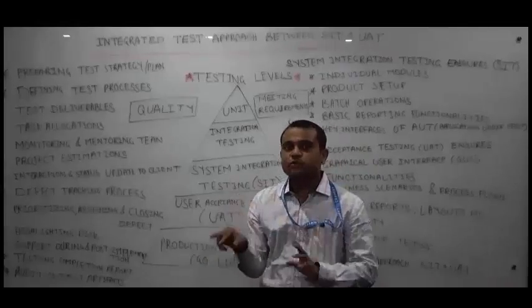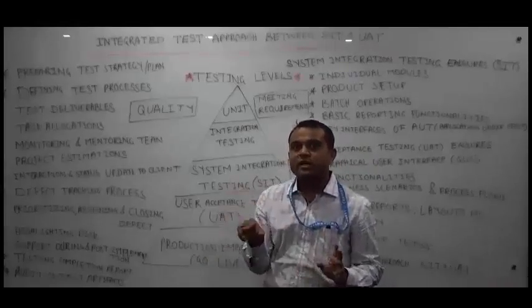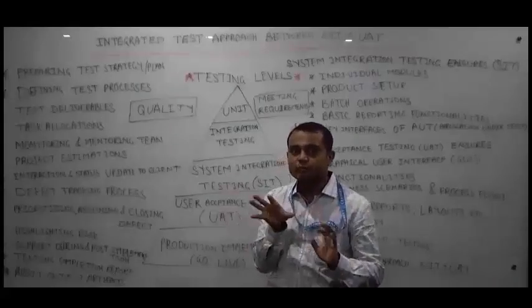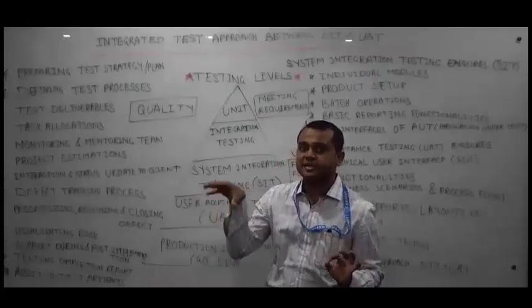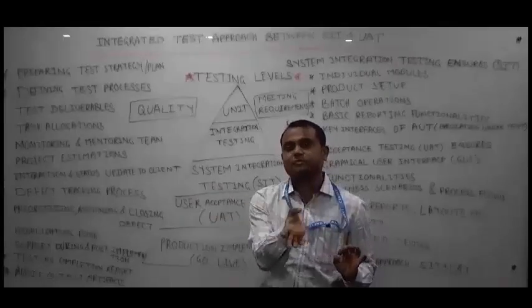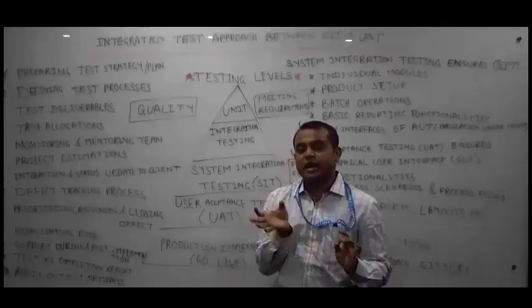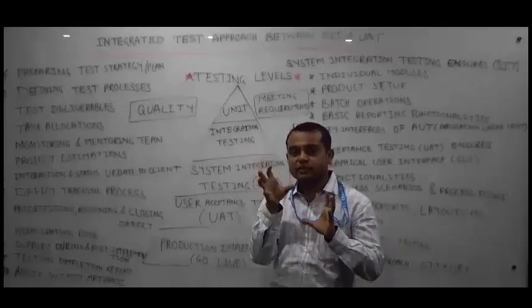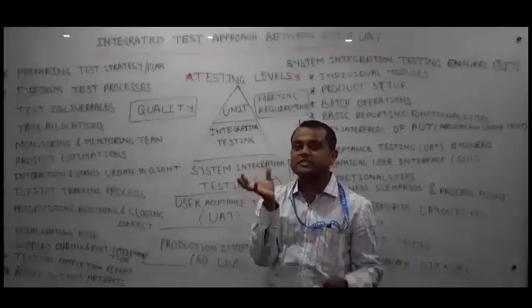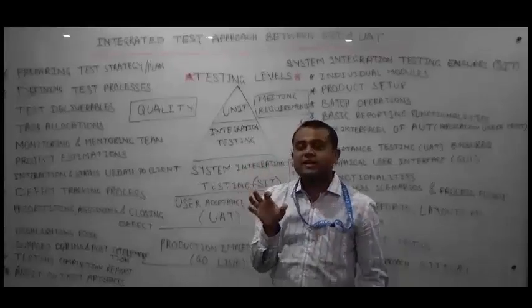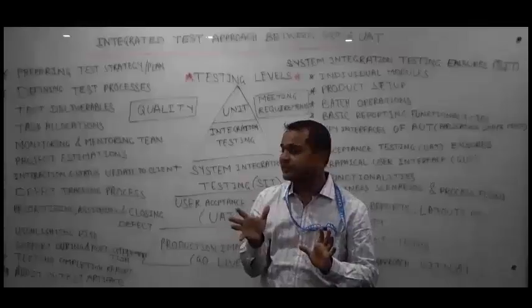And also in that CR both teams will sit together, there will be a combined call, and they will decide which kind of approach to take. The interface related part will be tested by SIT team, and the usability related part will be tested by UAT team, and once they identify the scope, then they will prepare the scripts accordingly. So half of the efforts will be divided there.